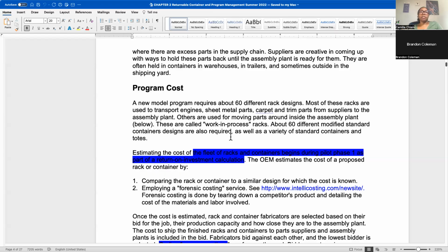But what they didn't know was that the supplier would buy 300,000, for example, but then the supplier knew that they weren't going to have enough, and they would just bring more in, and the company would just pay for it, and they weren't paying attention to it because it wasn't put into the beginning of the program. So for this particular program, I had given them some things to track earlier, and I told them it would be $600,000. And when they actually went to purchase it, it came out to about $600,000. And they were like, huh, we didn't know we were spending this much on packaging.